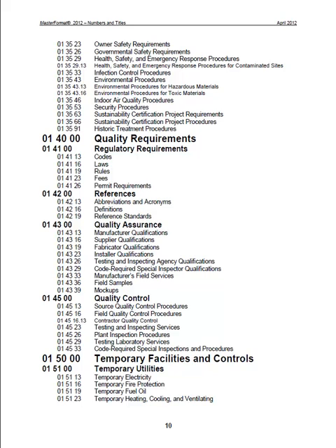Quality requirements, again: codes, laws, rules, fees, permit requirements. Sometimes even at the university we need to go to the town of Orono for a building permit for certain things because they want to know what we're doing on this campus. They want to know what life safety systems we're putting in, and they may have some ideas on what we should be putting in. Things like mock-ups down here under Division 01-4339 include things that maybe